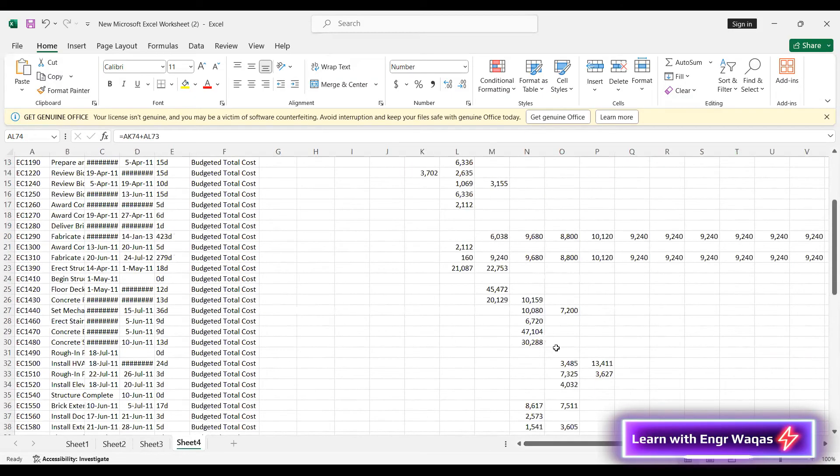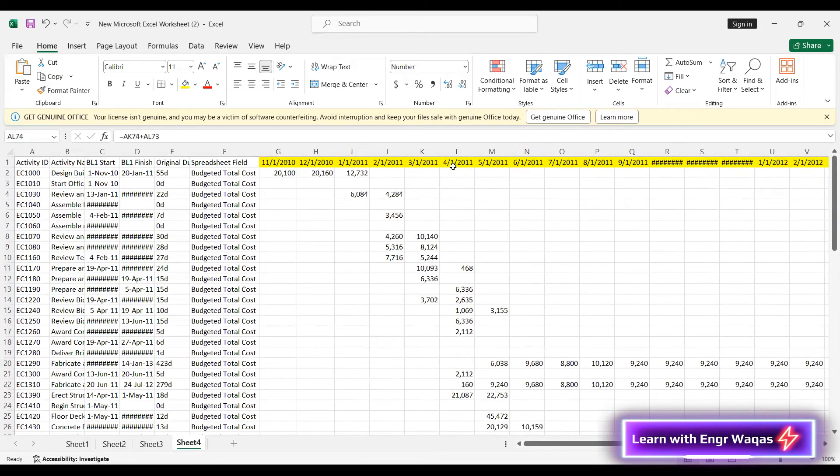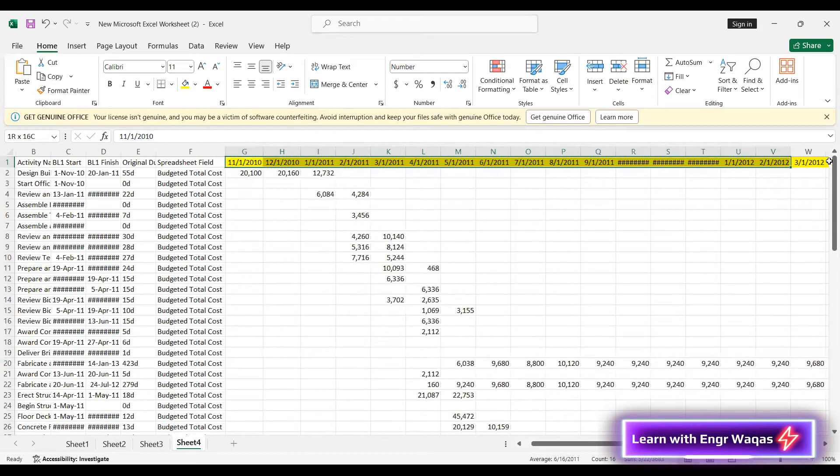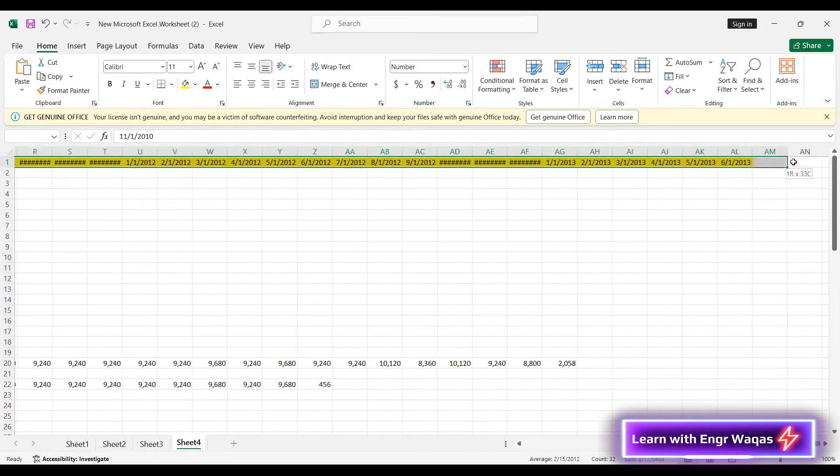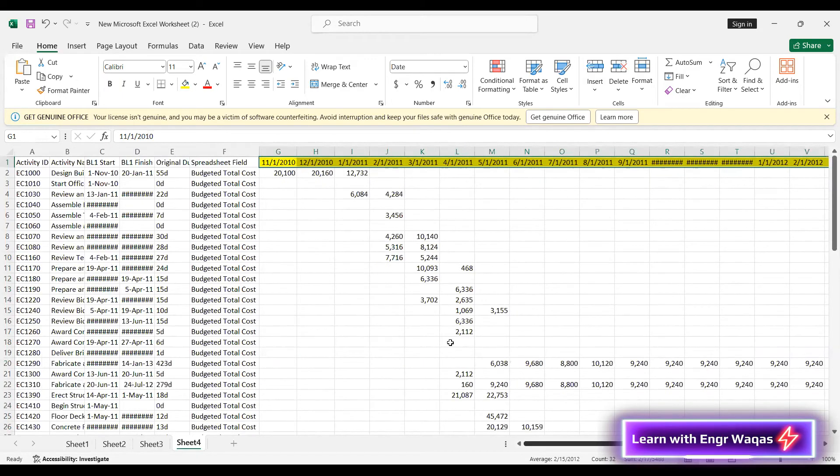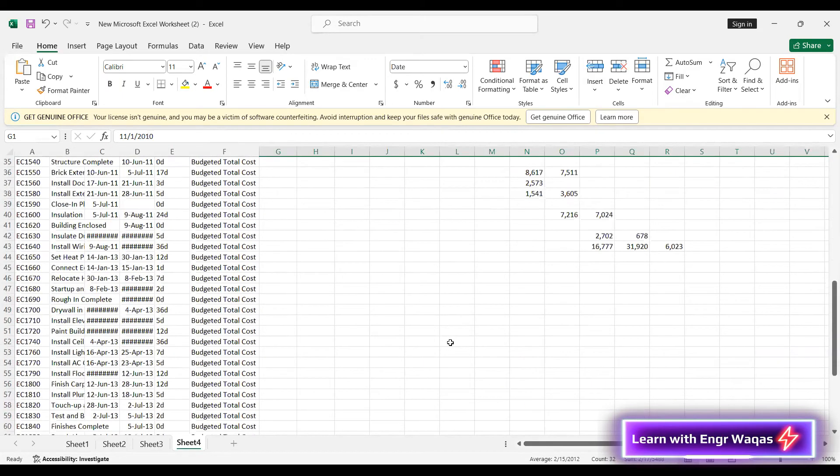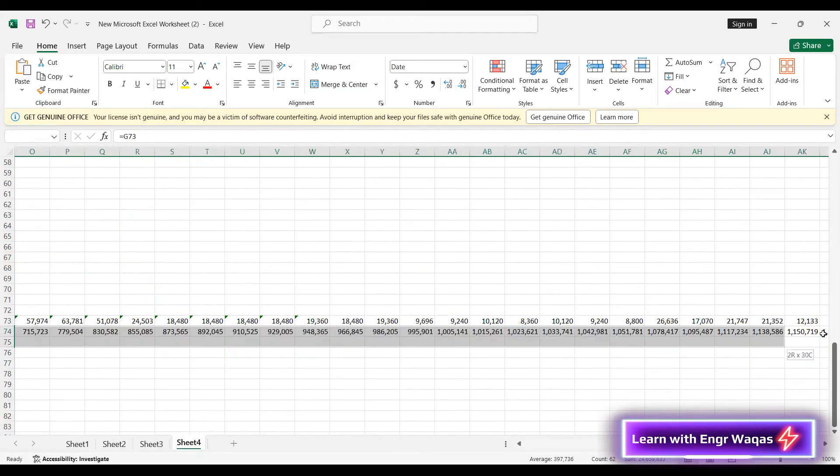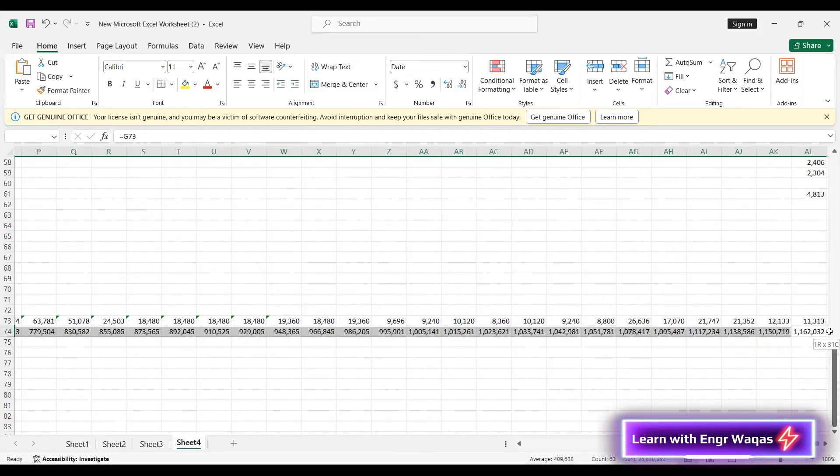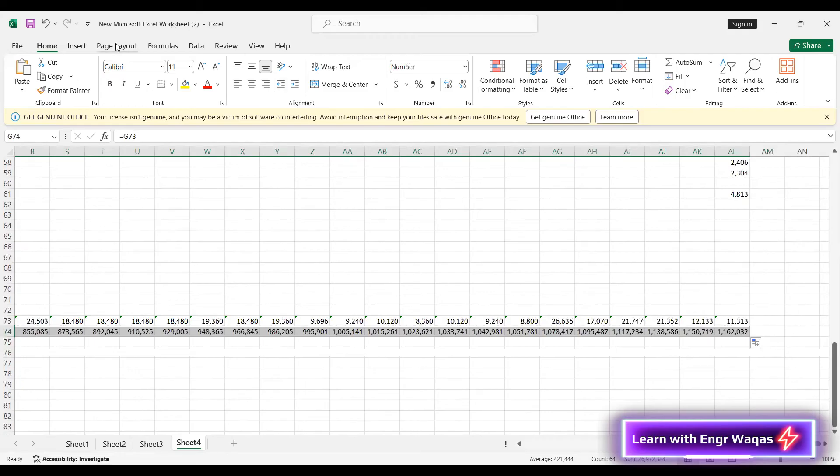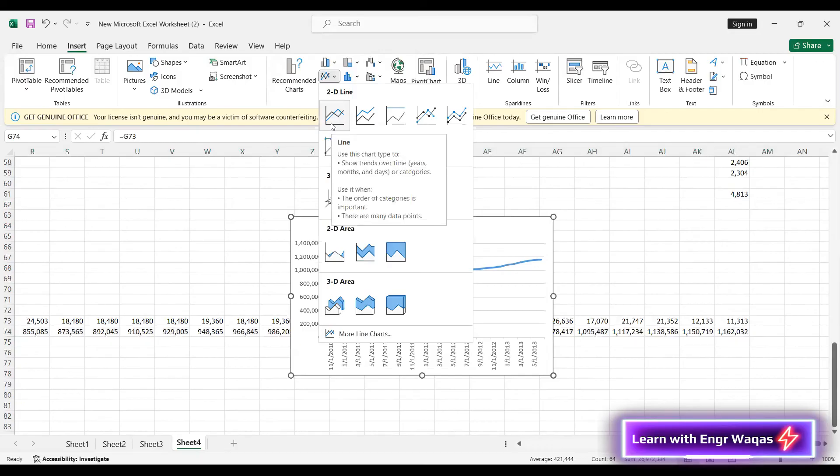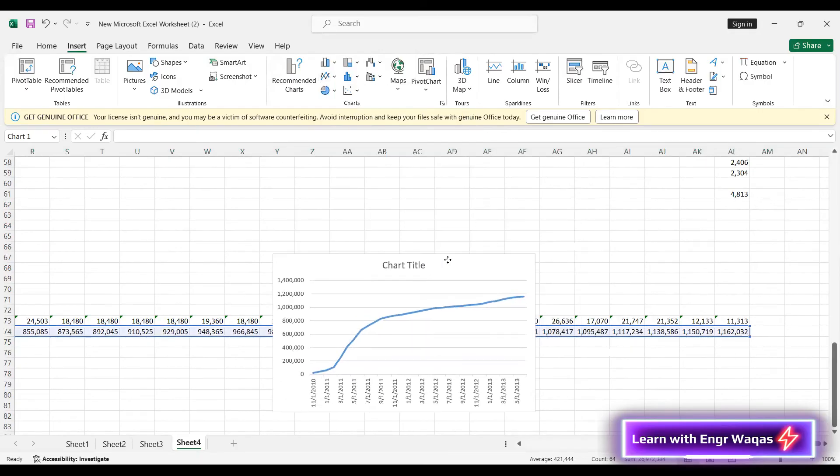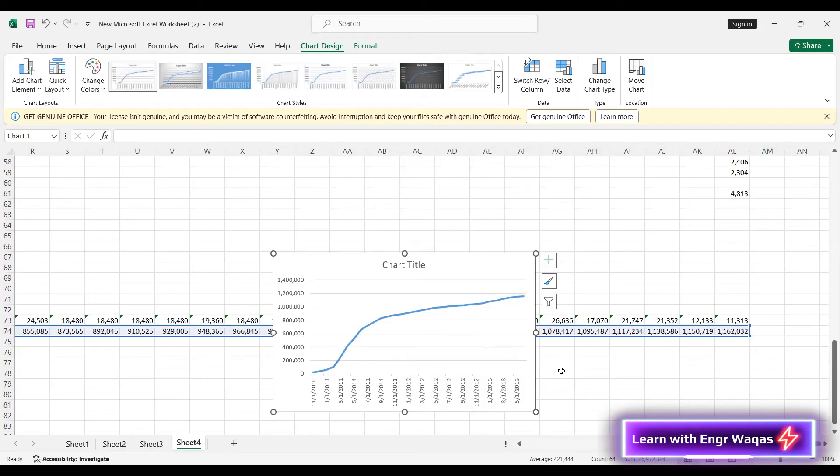Okay, now I need to make my S-curve using. See, select your timeline like this way and select your cumulative value row. See this one here. Control, keep pressing control on your keyboard. See, so that you can make your all the steps to generate S-curve. Now here is insert option. Go there and make here like this one. See, this is your S-curve. It's like bumpy. I think this is very steep and bumpy over here, but it's all given as per the data in this sheet.